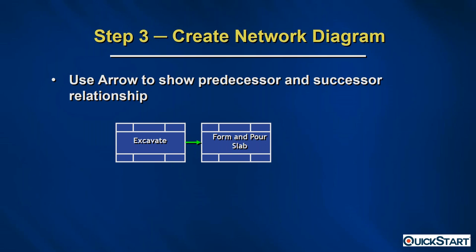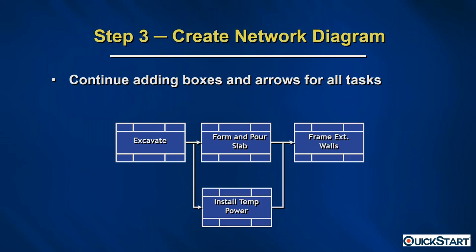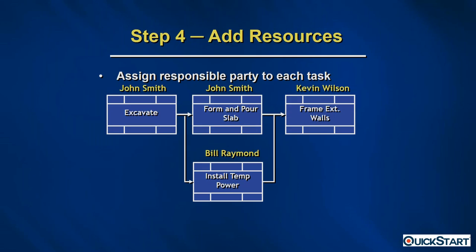We use an arrow to show the predecessor and successor relationship between those tasks. This picture tells us that the Excavate task must complete before the Form and Pour Slab task can start. We continue adding boxes and arrows for all of the tasks in the project. This simple four-task network diagram is what we'll use to explain the critical path method of scheduling.